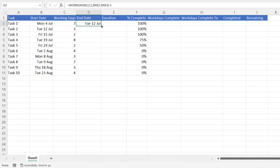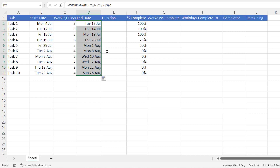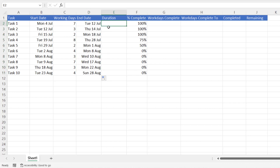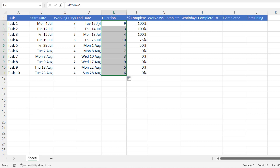I'll take that back up to a seven-day task and copy the formula down to get the end date for the other tasks. Now I need to calculate the duration of the tasks — the difference between the start date and the end date. The working days may be seven, but there may be weekends or holidays in that period which increase the overall duration. To calculate it, I take the end date minus the start date and add one, to include both the start and end dates. That gives me a value of nine — there's obviously a weekend in this period.